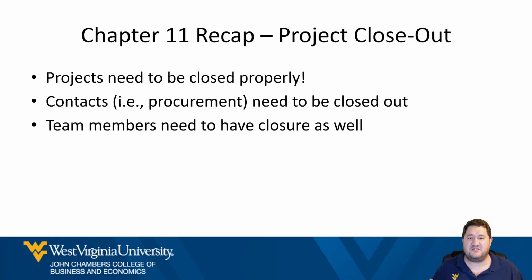Project closeout. So the last phase of a project, we're closing it out. This needs to be done properly, because the quality and effort you put into this part is going to impact future projects. When I say that, it's because people will look at, let's say, the lessons learned or the documents of your project, because they might be doing something similar. They're looking at how you did it, so they don't have to reinvent the wheel. But if you put down that you did it one way, but you didn't put what the result was, that it failed miserably, or you had great success, the next person who might be doing something similar could be going down the wrong path or the right path. So we want to make sure we do lessons learned, have a meeting at the end where everybody can be free to say what they thought was good, what they thought was bad, without any fear of repercussions.